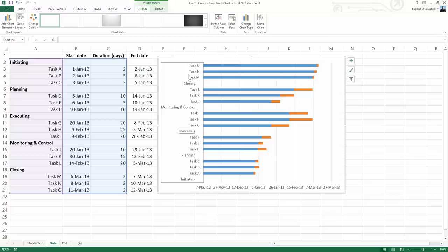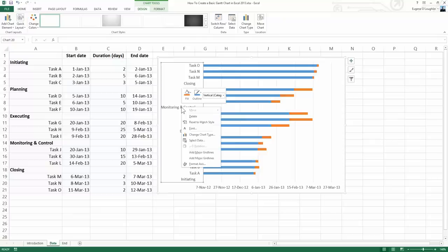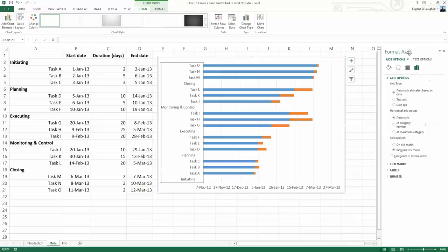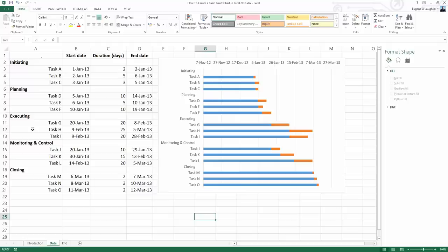You can see that our tasks and headings are labeled here, but they're in the wrong order. This is quite easy to change, so right-click on the Y-axis, choose Format Axis from the pop-up window, and this will display the Format Axis options on the right-hand side. The option you're looking for is down here near the end, Categories in Reverse Order. Just click on the checkbox there, and we can now see that our categories are listed in reverse order on our chart, and they match the values in column A. You'll notice that our tasks are represented by blue and orange bars, and that our headers are represented by blanks simply because we did not give them any values in columns B, C, and D.